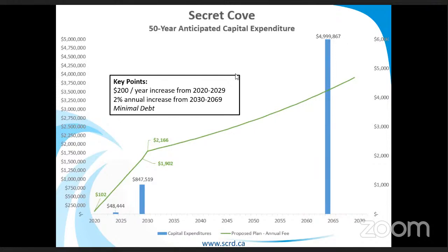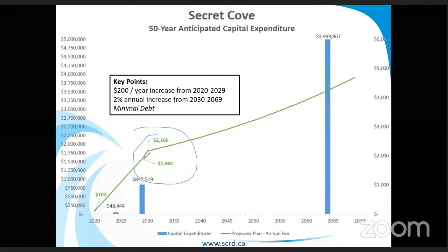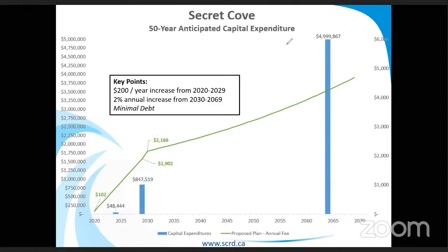The plan that we talked about last year was an aggressive plan where the goal was to accumulate reserve and pay off minimal debt. In this situation, there would be a $200 a year increase from 2020 to 2029 and a 2% increase after that. There is a small jump due to some debt financing, but it's similar in line to the $200 a year increase. One of the challenges with Secret Cove is this upcoming infrastructure in 2029-2030 with the treatment plant — it is a fairly large expense coming up soon. In this scenario, we consider paying off the debt in 10 years to allow us to accrue as much reserve as possible for future construction. This is the most conservative scenario and the safest from a financial perspective.